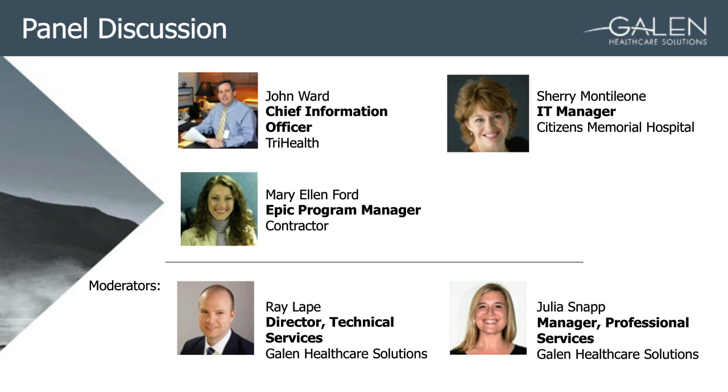You've got to have clinical people involved, and Galen was great to help with that and provide these giant spreadsheets where basically you say, you called it a CBC, we called it a CBC.1, whatever, and you map. Their system maybe would allow alpha characters in a field and ours was numeric only. Theirs would maybe allow blank and ours wasn't. So there's just lots of mapping to be done.